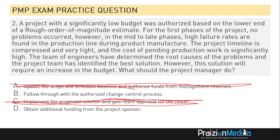There's also loquacious babble in this question: the team of engineers have determined the root causes and the project team has identified the best solution — they identified the best solution, so why do you need to gain approval if they were already part of it? The story doesn't add up. Option D says obtain additional funding from the sponsor — you do get additional funding, but you don't just walk up to the sponsor and say give me more money. You need to follow through with the approved change control process. It's the most vanilla-flavored answer, but it's the best and most correct because every organization has their own way they manage change.